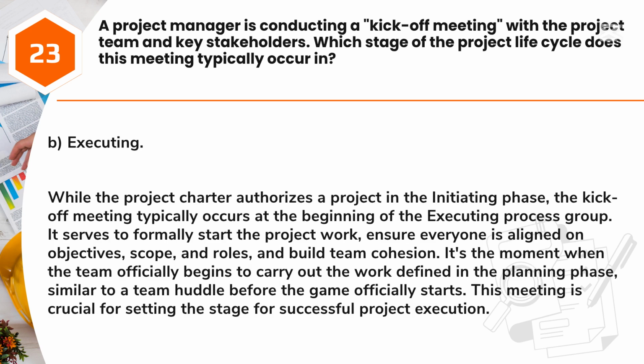Answer: B. Executing. While the project charter authorizes a project in the initiating phase, the kickoff meeting typically occurs at the beginning of the executing process group. It serves to formally start the project work, ensure everyone is aligned on objectives, scope, and roles, and build team cohesion. It's the moment when the team officially begins to carry out the work defined in the planning phase, similar to a team huddle before the game officially starts. This meeting is crucial for setting the stage for successful project execution.